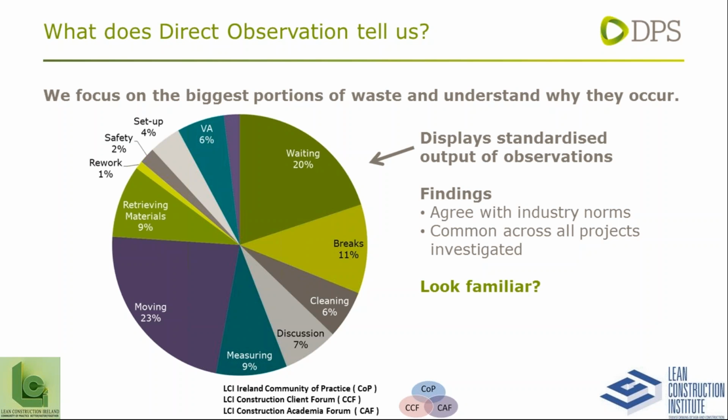Yeah, John, can I come in on this? Yes, certainly, Richard. Just to add on to that point as well. In a lot of observations we've done, what we have found is that people have been following documented procedures, whether they're scopes of work, specs, training packs, and so on. So as Barry outlined, if a documented process or procedure is identified to have gaps in it, and that's leading to waste creeping into the processes on the ground, it's very important to make sure that documentation is updated and then recommunicated back out as the new baseline procedure to the team.